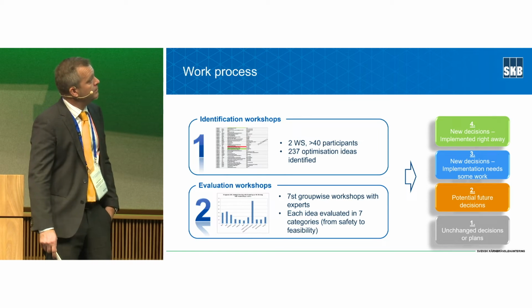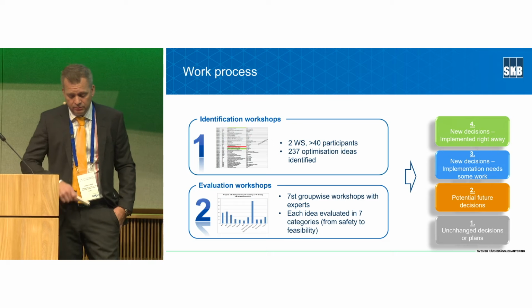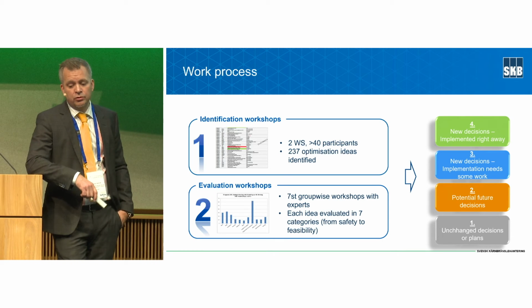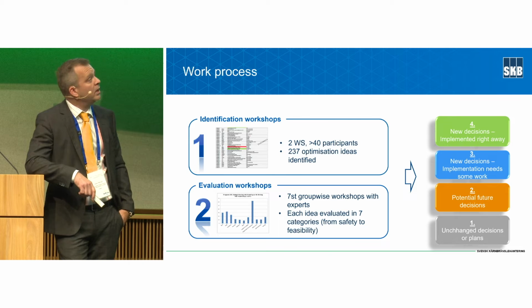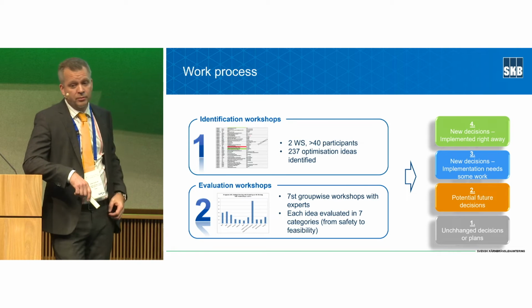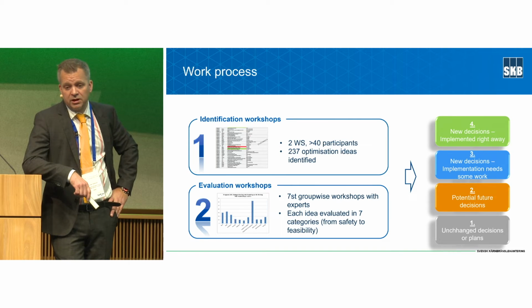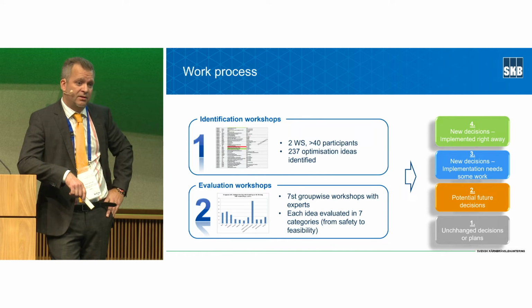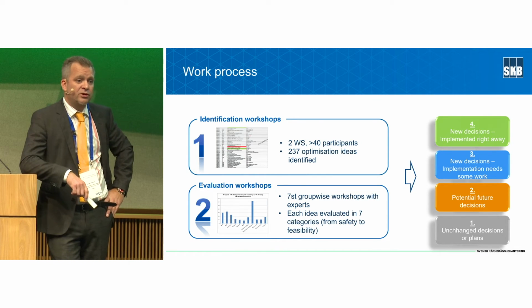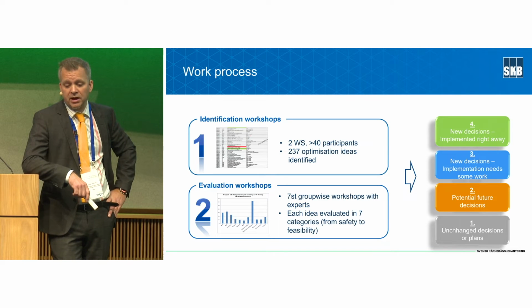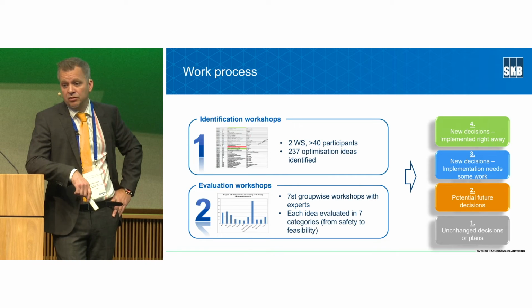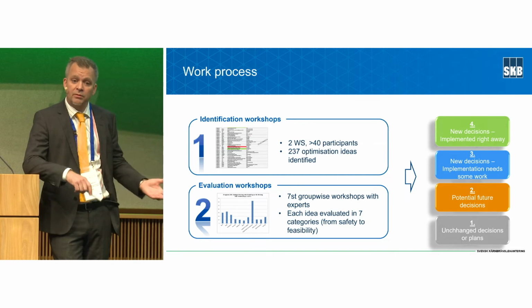So what we did, we gathered people from all over the company. We did 2 workshops. First we had an identification workshop, and the intention was just to gather all the ideas that we possibly could have, go back to solutions that we had thought of earlier, and just get new ideas. And it went really well. We ended up with 237 new ideas, some of them big, some of them small.